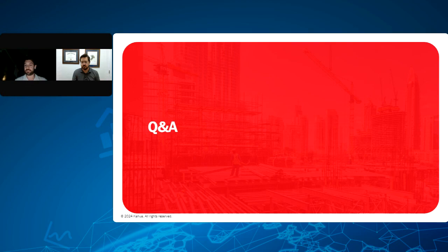Next question, how would you establish a business process such as the change control process for an RFI response? Great question. So we already have tools like that out of the box. We have an RFI tool that takes an RFI that has a cost impact that has been completed and needs to be elevated into something like a change event or an issue, then further into the change control process with change orders and requests for quote, rough order of magnitude, and things like that. So we do have an out-of-the-box tool for that.